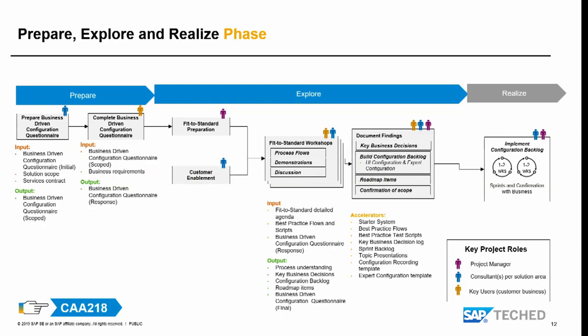You see here that in the explore phase, it's important to prepare the fit to standard workshops and to enable the customer, the project team, for that. So these fit to standard workshops are really tight, and you will be under lots of time pressure. Most of the projects are global, and most of the experts have to fly to the location where the workshop takes place, and there are lots of processes that need to be discussed and lots of business decisions that need to be made during these workshops, so they need to be prepared very well.